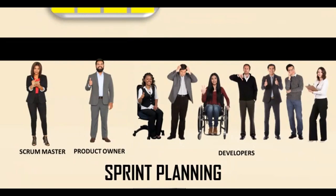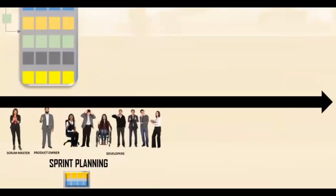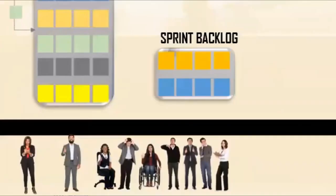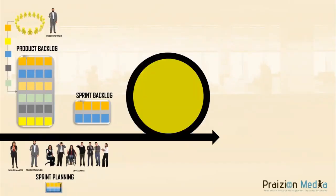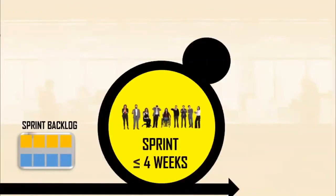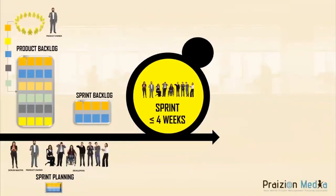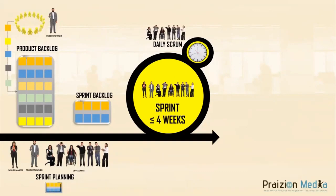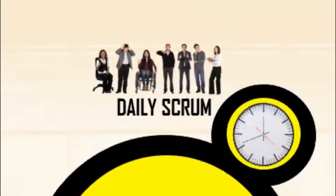The developers are those individuals who get the work done. In sprint planning, our goal is to come out with a sprint backlog that has a goal and the items we're going to work on in the sprint. The sprint is a time box — in Scrum, anywhere from one to four weeks. The next event is the daily Scrum, where the team answers three questions: What have I done yesterday to move us toward the sprint goal? What am I going to do today toward the sprint goal? Are there any impediments or accelerators?